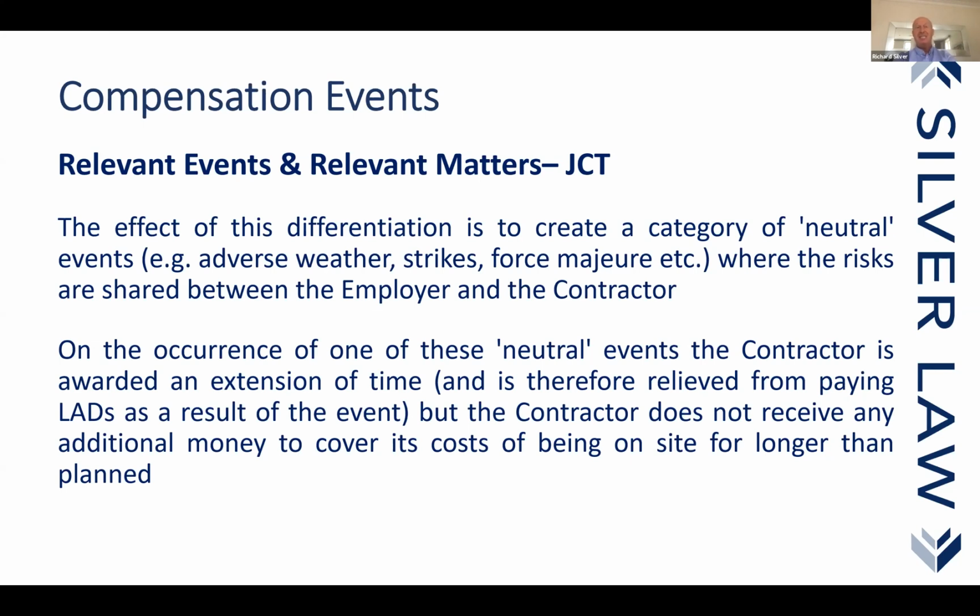But we look at it and it simply is not going to delay the works because it is external works which is off the critical path. And therefore, there is no entitlement to extension of time. But there most definitely is entitlement to loss and expense. And indeed, if you look at the variation clause under the JCT, it expressly provides for the valuation of loss and expense as part of a variation.